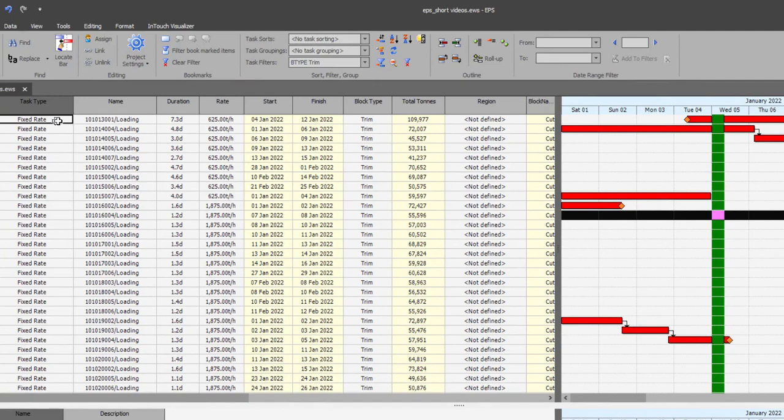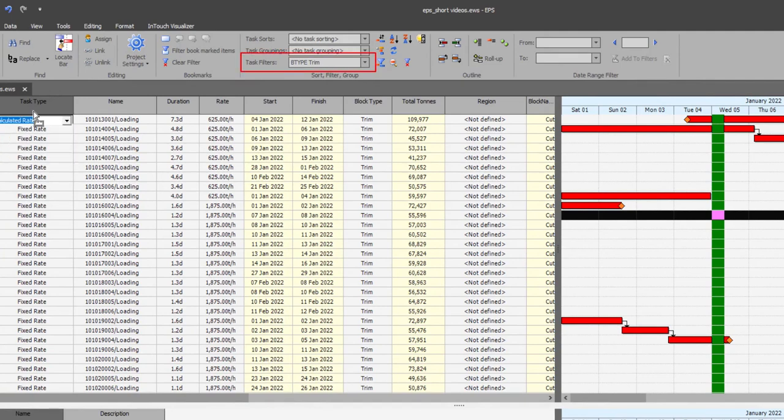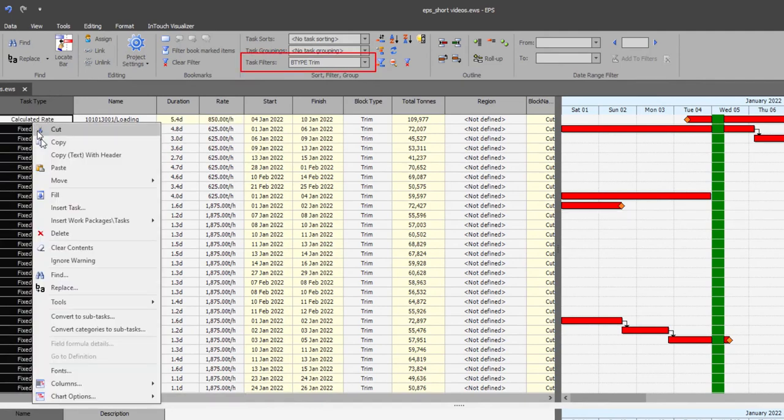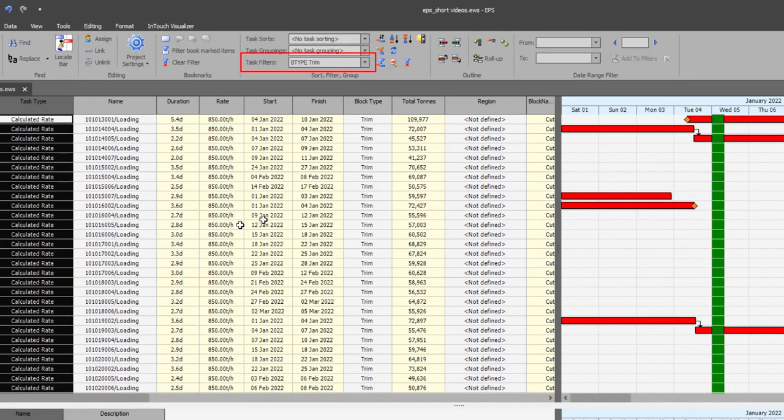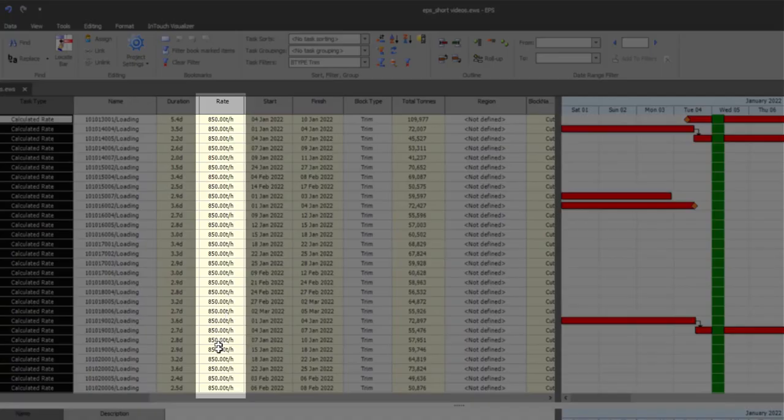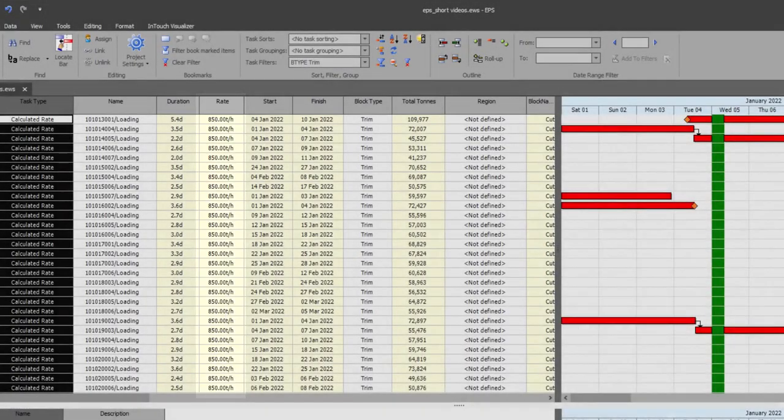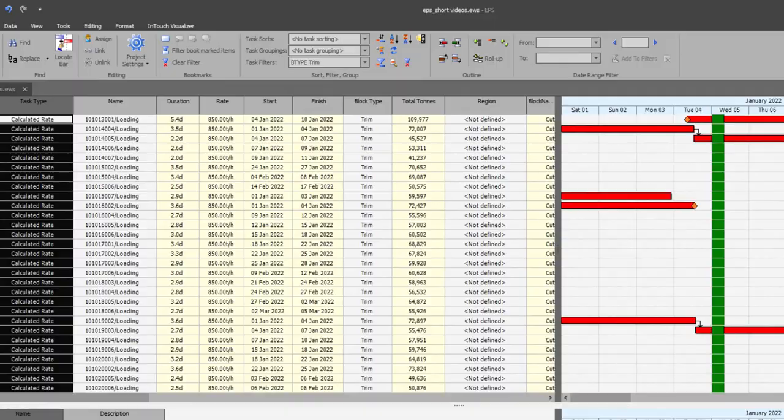You can see the impact on the task table if I filter out the trim blocks and set the task type to the calculated rate. You will see the rate being 850 tons per hour.